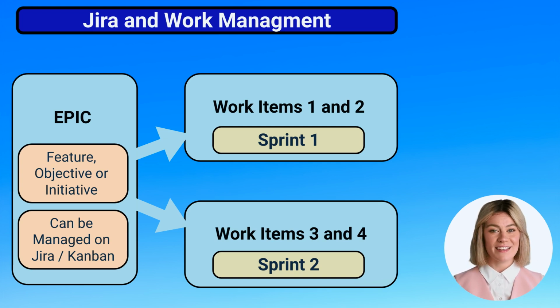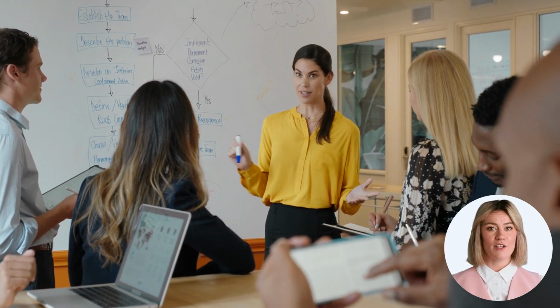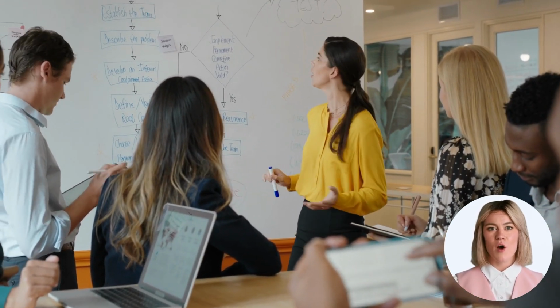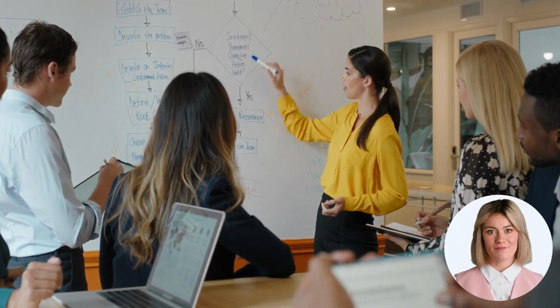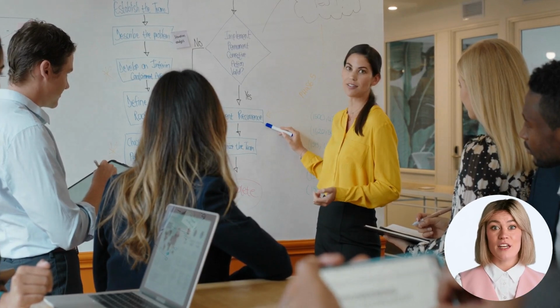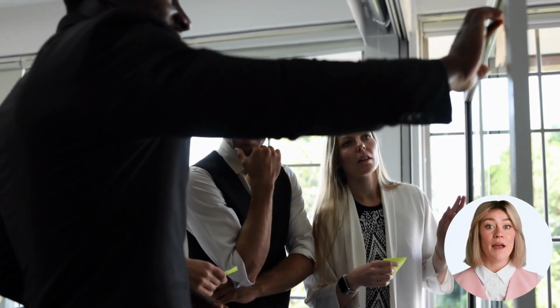Now let's look at daily stand-ups. Daily stand-ups are short, time-boxed meetings, usually 15 minutes, where the team gathers to discuss progress. Each member answers 3 key questions. What did I accomplish yesterday? What will I work on today? Are there any blockers?